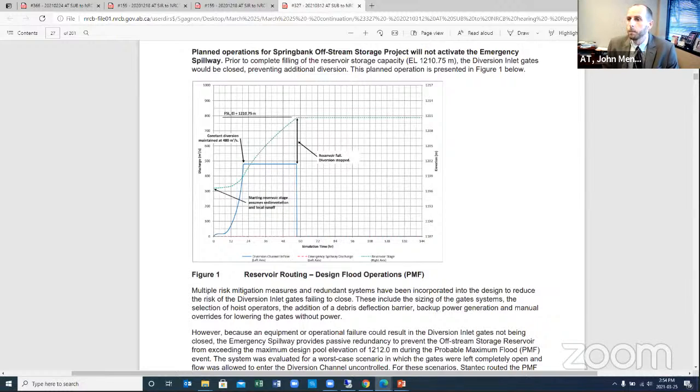We did not submit it, and as I understand, the board has recognized that there is another regulatory entity that has purview over the dam safety arena. Alberta Environment and Parks Dam Safety Division will review the operation, maintenance, and surveillance manual prior to authorization to operate.